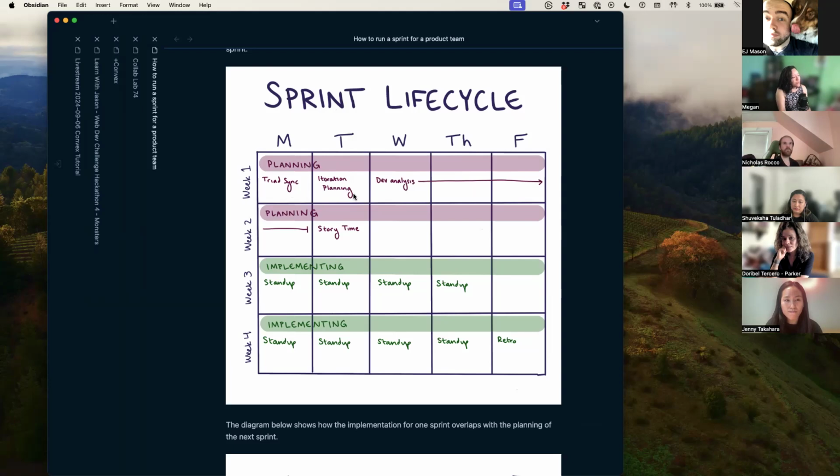And then there would be an iteration planning meeting where they would share that with the developers, and the developers would get assigned to those tickets to do some more analysis to investigate what it's going to take to get these acceptance criteria met, and whether we need to break down any of these tickets into smaller chunks, and things like that.